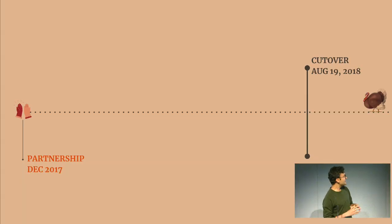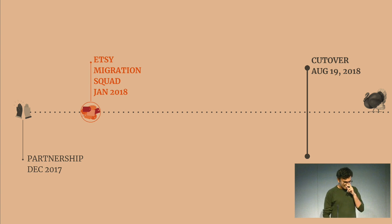So to paint a timeline, in December 2017 we had the partnership, and we set ourselves a goal of cutting over by mid-August, so that we would have enough time to hit Thanksgiving and Cyber Monday with confidence. So how did we approach this from an organizational perspective?